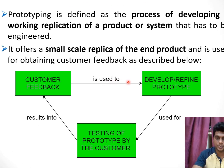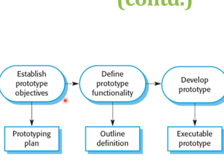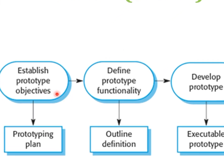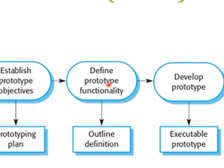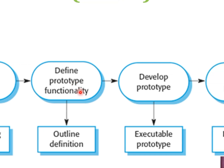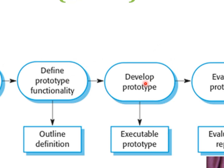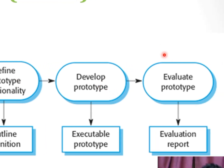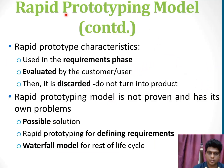Customer feedback is used to develop or refine the prototype, which is then used for testing by the customer, and then handed over to the customer for their valuable feedback. In this model, first we define the objectives required to establish the prototypes. Based on the objectives, we define the prototype functions. After defining the functions, it helps to develop the prototype model, and after developing it, we can evaluate its performance.